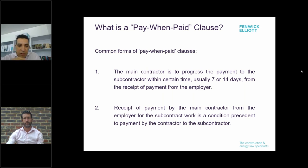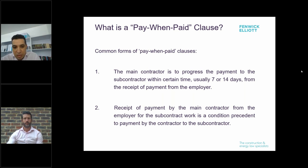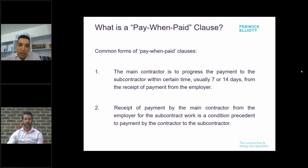The first form provides for a time frame to make payment, which starts to run from the receipt of payment from the employer. Sometimes this form also includes a provision that if no payment was made by the employer within a certain amount of time, the main contractor will have to pay the subcontractor within a reasonable time — making it less problematic in practice. The second form is where payment is a conditional obligation, a more rigid approach that makes clear the subcontractor accepts the risk of non-payment by the employer.